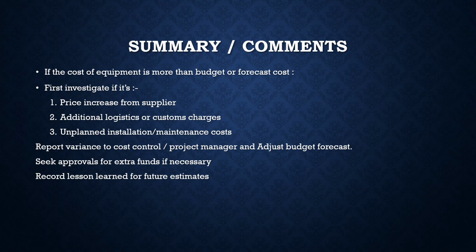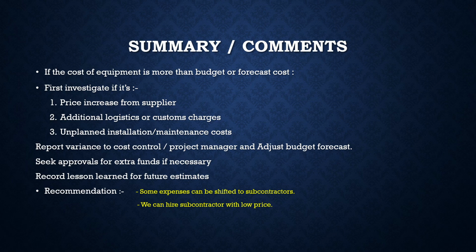Recommendations to manage costs more effectively include shifting some expenses to subcontractors when possible, hiring subcontractors at lower prices, and closely handling and monitoring equipment usage on site to prevent unnecessary costs.